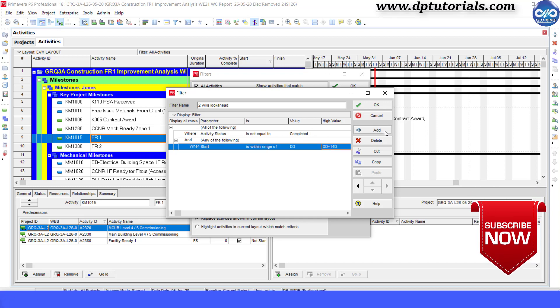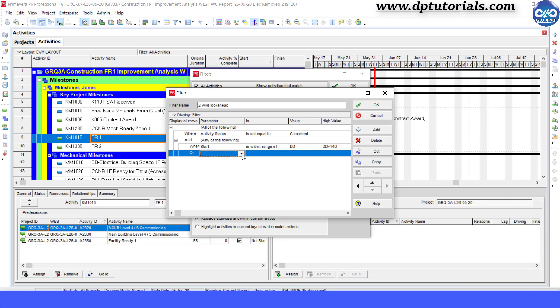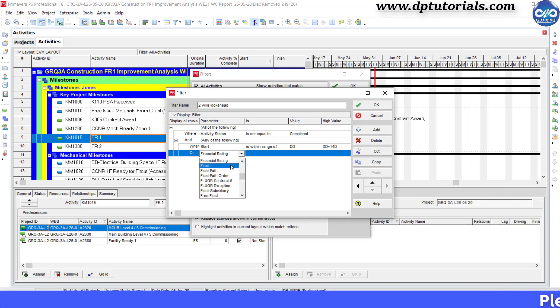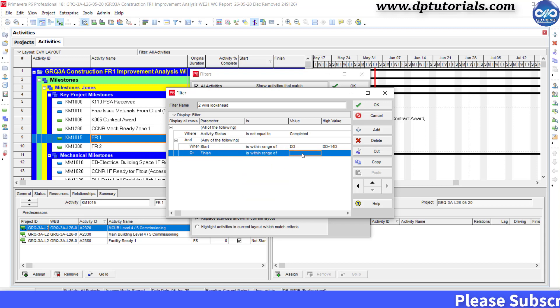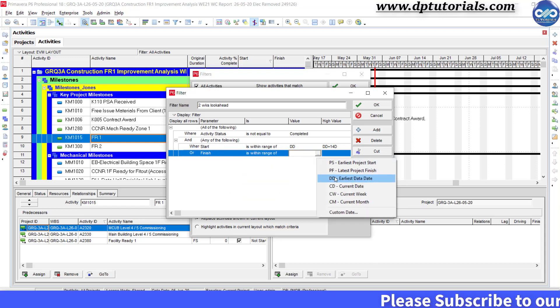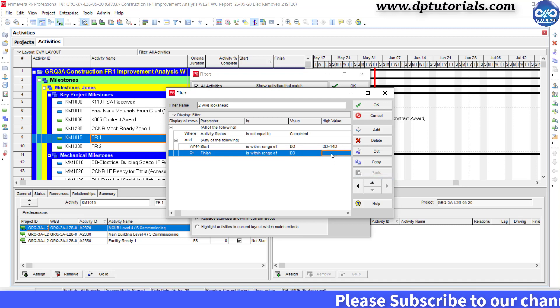Click add again and give one more condition as finish is within range of DD and DD plus 14 days.